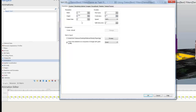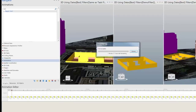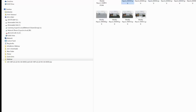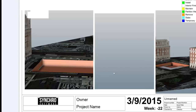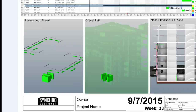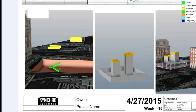I've got the correct size and will export one frame per week for the full project duration. Hit OK and as it renders out, you can go to Windows Explorer and see each individual report being rendered. Opening them up and stepping through, you can see the Gantt chart displaying the two-week look-ahead at the top with your custom views. One thing I glossed over: you can create viewpoints for each of these views, and save them with the animation.